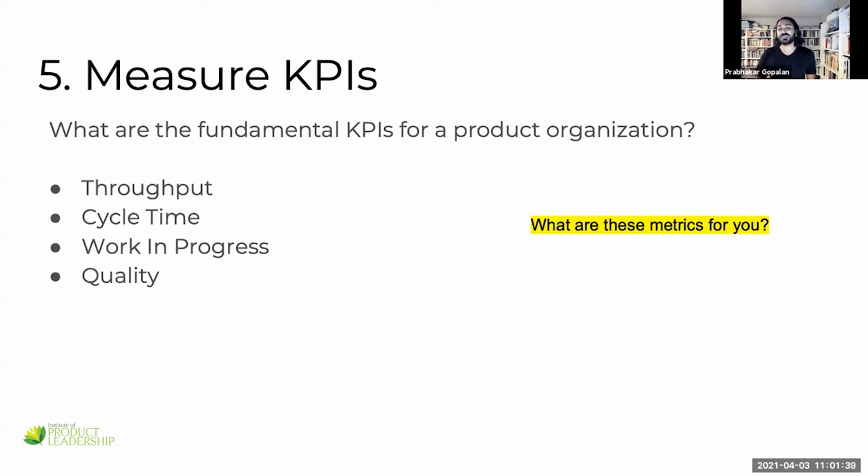If you didn't have these metrics, each time you'd be asking, how long will it take for you to do this? How long will it take for you to do this? And there's all this back and forth. But a smart product manager would quickly understand, through historical cumulative flow diagrams, how fast an organization can produce these things, and what it takes for the organization to deliver at the time of planning, not at the time of implementation. It's mostly late by the time of implementation.